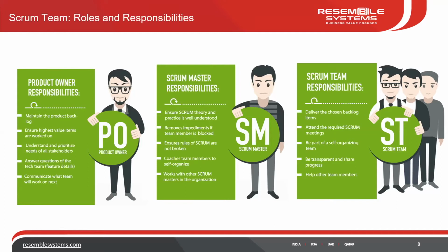Next, what he does is he develops something called a product roadmap. Product roadmap, in the sense of, for example, features, right? From the product vision, say I need an app. So what will the first thing be in the app? Maybe the first feature is login, and after login we will see the account balance in the savings account, the current account, and the credit card. Okay, that's the roadmap. That's the first release's features.